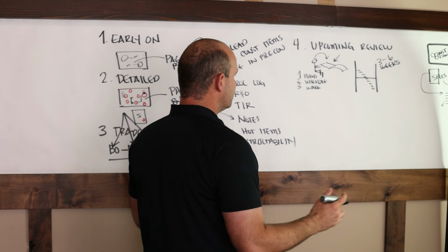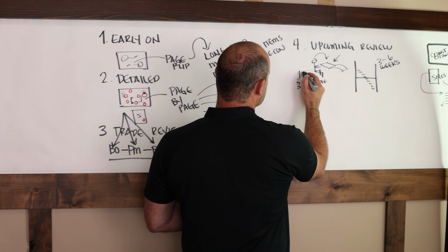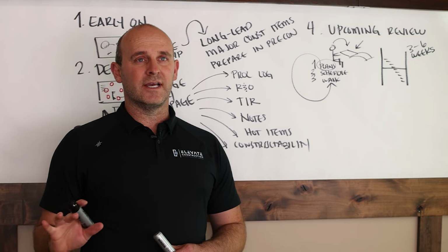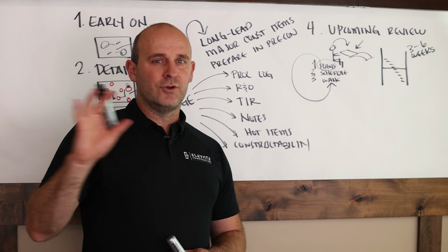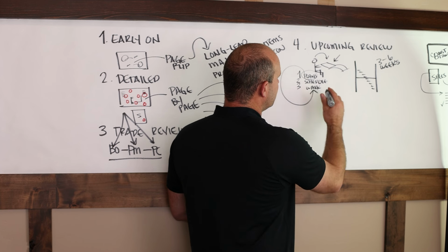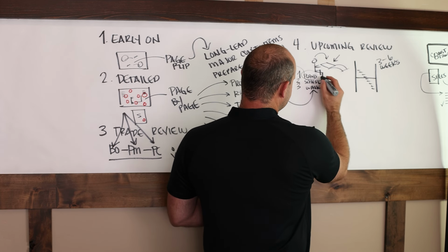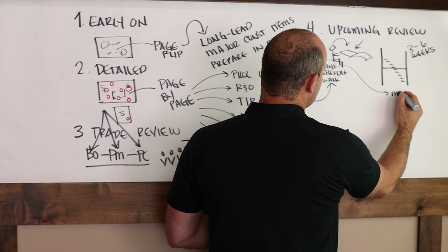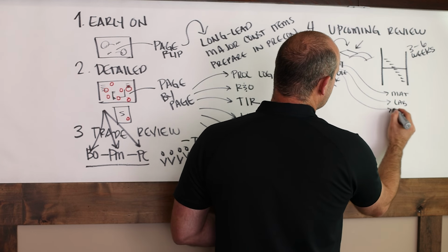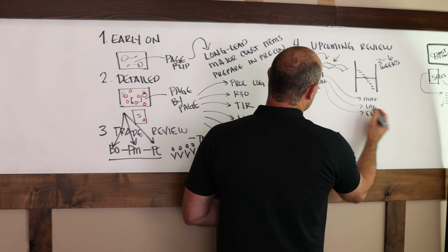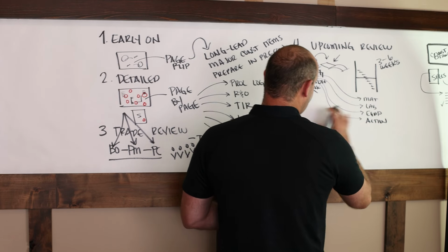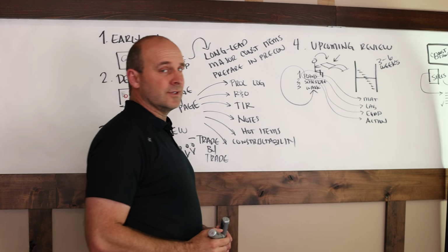That's key, because when you read the drawings, you have that fresh on your mind for when you go out there and do your walks, and you literally have a nice perspective. You can interface the right way. You know everything's happening in the right manner. And here's the other thing. All this does is trigger the right things to happen. So when you're reading the plans, you can say, hey, do we have the material? Hey, trade partner, are you ready for the labor? Hey, did you order that piece of equipment? Everything you do here is to trigger action for something, and the action will be what's needed in the next 3 to 6 weeks.